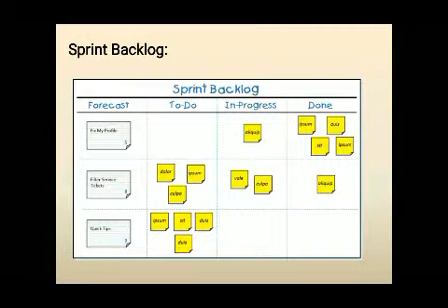Assuming the product backlog has 6 stories, the team decides to do stories 1, 2, and 4. During sprint planning, the team realized that there were still some questions not answered well by the product owner. So they decided not to include user story number 3 and jump to user story number 4, which was defined well. The sprint backlog is owned by the development team and contains what gets delivered and how.